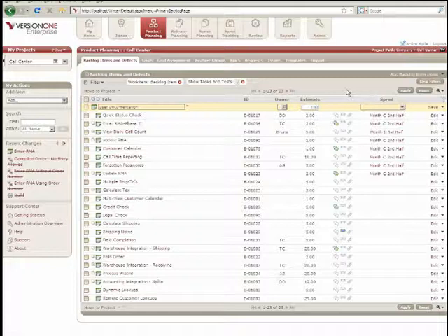So yeah, you usually start off. If it's a feature, a high-level feature, like in the old days what we called a use case, you would start off with a large estimate and then break that feature down into smaller stories. And typically your smaller stories, again, depending on your culture and how you estimate if you're using story points, are 1, 2, 4, 5, 8, for your iterations. But before they're in the iterations, they're usually larger.